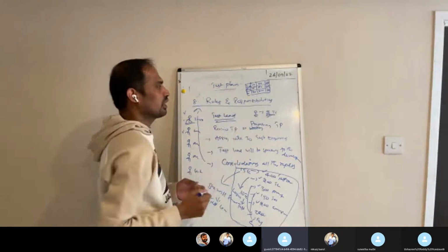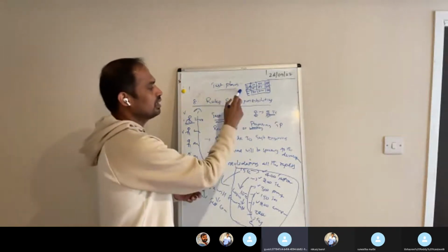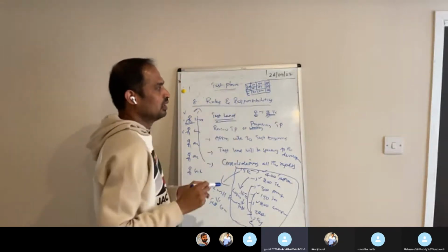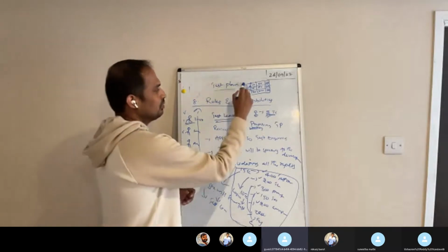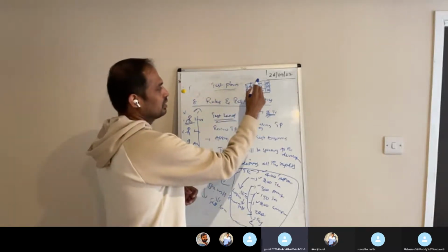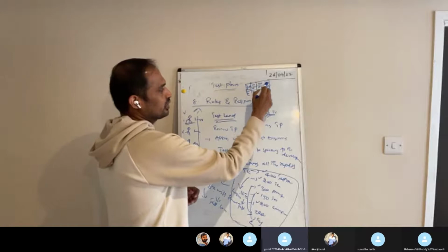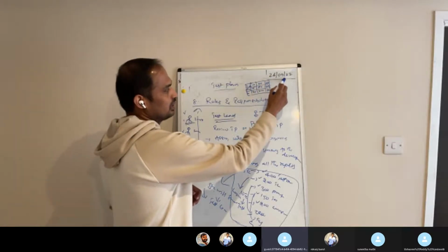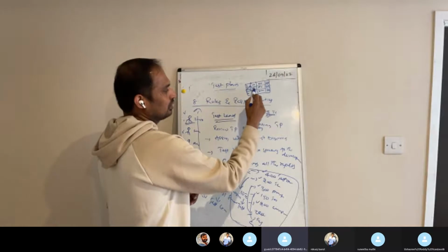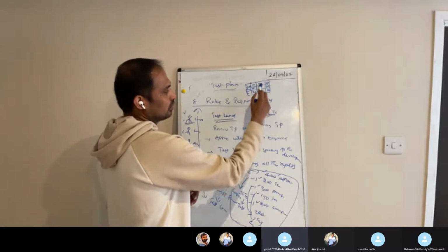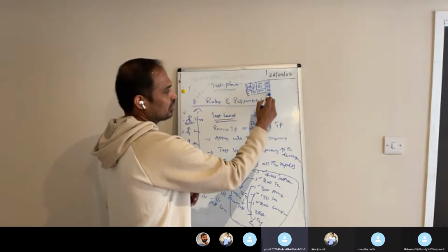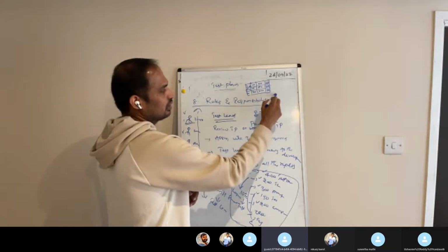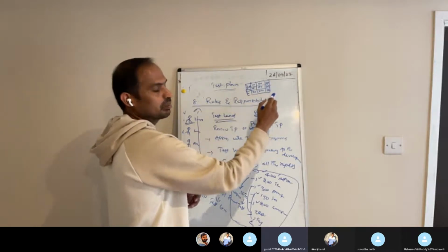Suppose this is the template that we are going to follow in this test report template. We are going to have a feature name, number of test cases, number of test cases executed, number of test cases passed, number of test cases failed. Okay, total count, total pass percentage, total fail percentage, and total remaining percentage.